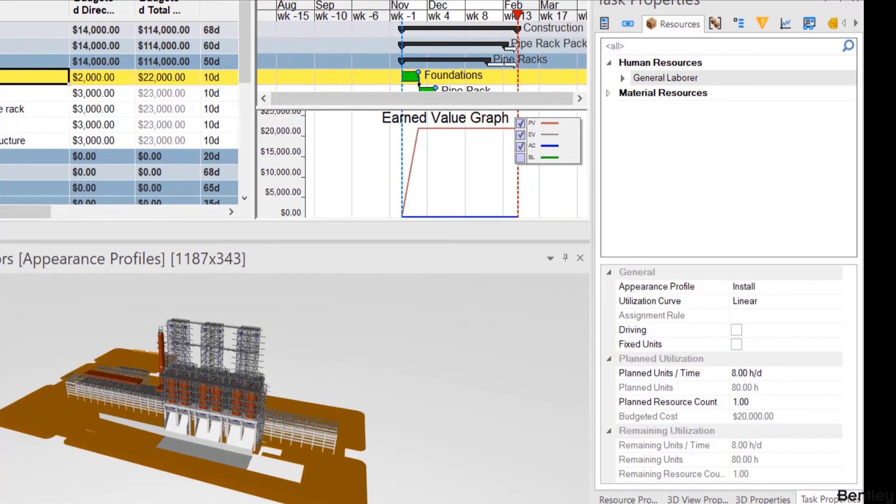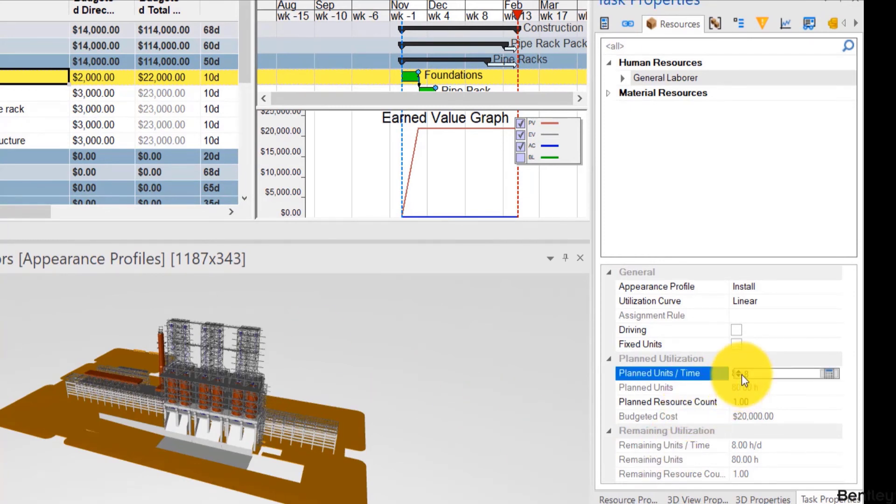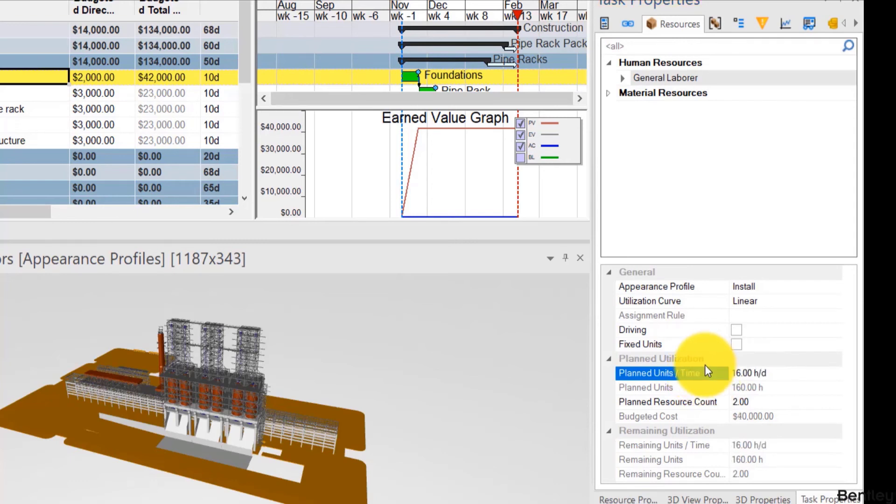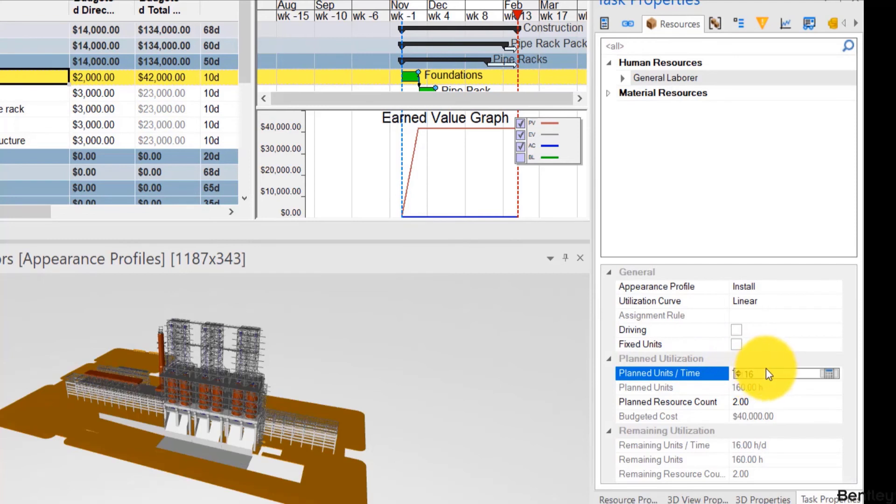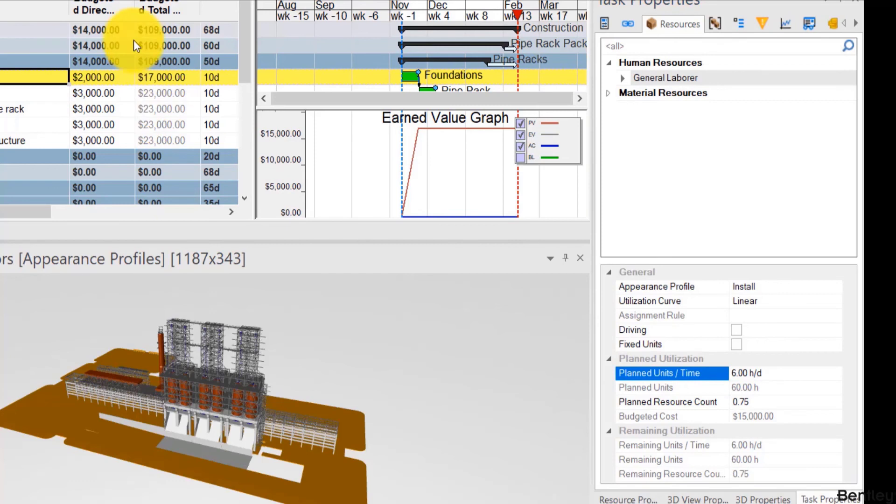So this task, for example, uses general labor, but does it use eight hours per day? Or does it use 16 hours per day? Or does it use a fixed number of hours? So we change that and we see the cost change. I'll change it back so you can notice it better. So right now it's at 42,000 and I change it to six. It's back at 17.